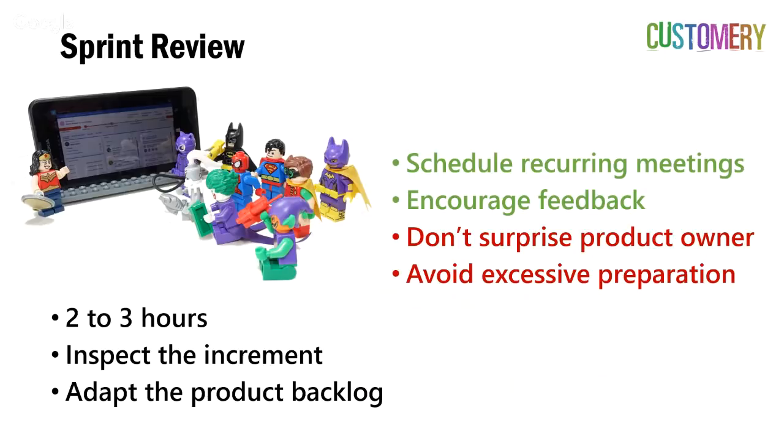I've seen teams prepare excessively for a sprint review. I don't know whether it's nerves or a poor state of their demo environment, but they might spend a day preparing demo data, migrating all the new features across to that demo environment, rehearsing it, doing handoffs between different development team members. Try and avoid all of that. It should take you an hour, maybe 2 at most. I'd recommend having one team member do all the demos, or the product owner if he or she is ready, and don't keep swapping people, because it gets a little bit distracting with the changeover. So you shouldn't take more than an hour to deploy your features to a demo environment. The demo data should already be there, and you're ready to go at any time.